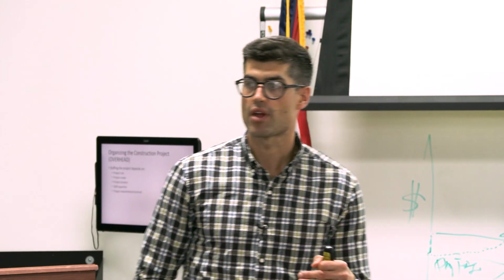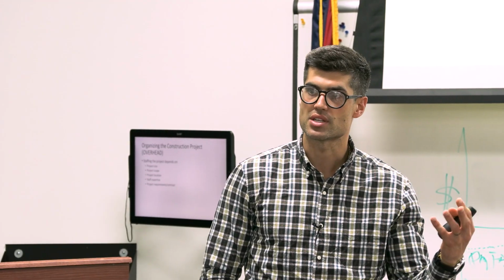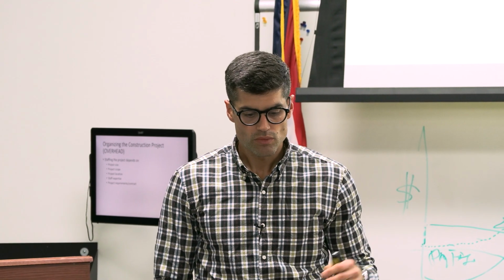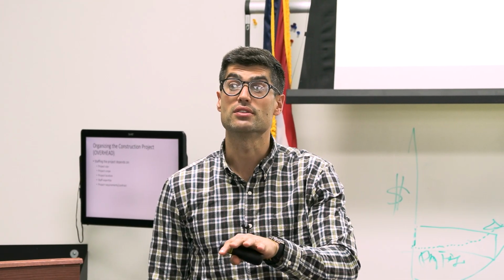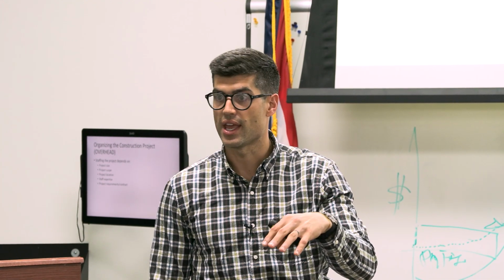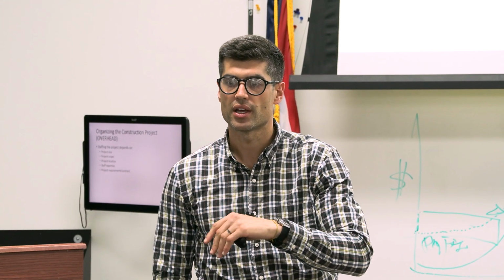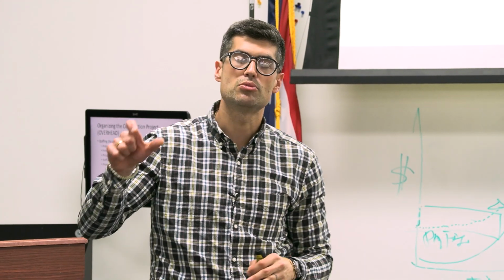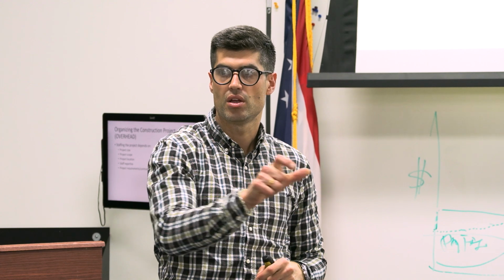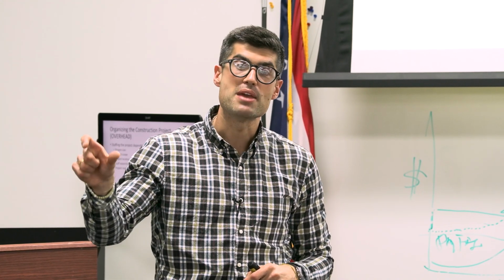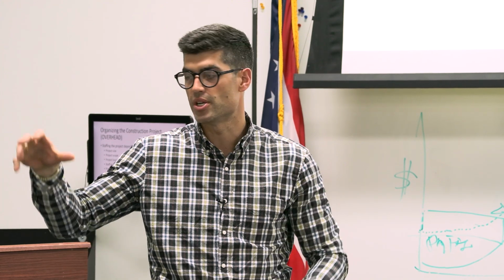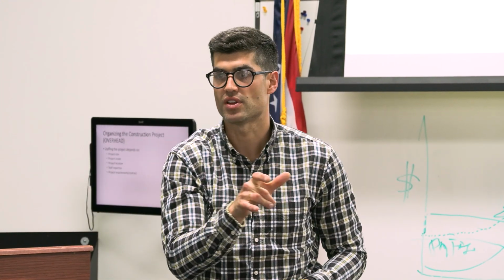Next is our expertise. How you guys, from an estimating standpoint, align the expertise should be as follows. Let me give you guys a great example, the Kent State CAED, which is a cast-in-place post-tension building. I could have someone who's coming off a parking deck in Cleveland. Completely different buildings. One's a higher education building, one's a parking deck. I want to align the critical path activities of that project with the next project, right? So maybe that project manager, the superintendent, or the field foreman who just built a parking deck would actually be perfect for the Kent State CAED because the biggest critical path of that building is the concrete. Very similar to the structure they just came off of.